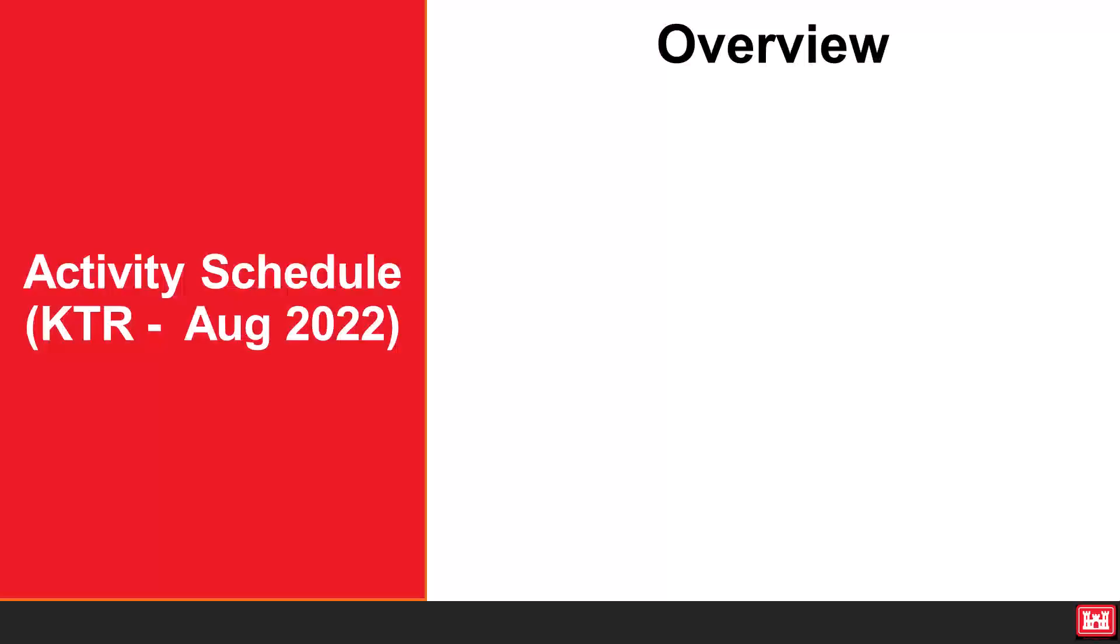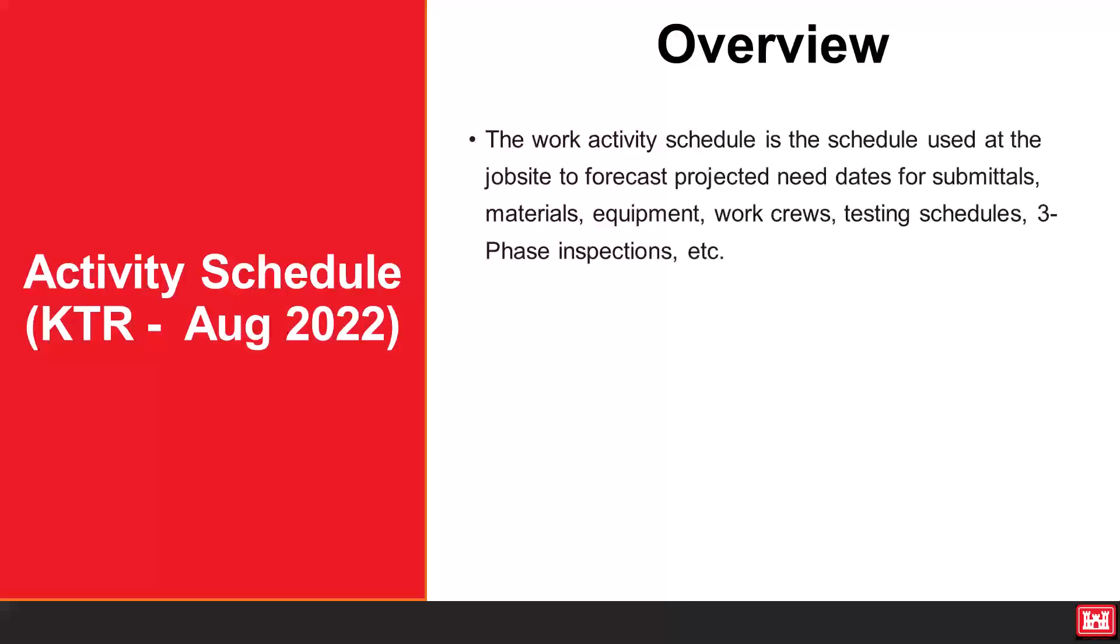The work activity schedule is the schedule used at the job site to forecast projected needed dates for submittals, materials, equipment, work crews, testing schedules, three-phase inspections, and so on.